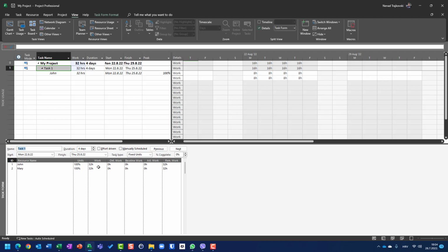Now, what will happen if I make it an effort-driven task and remove Mary? Remember that both of them work 32 hours and the total amount of work is 64 hours.